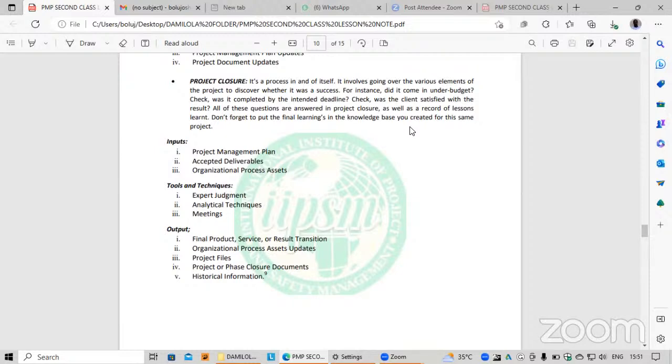And so it is the duty of the project integration manager, amidst other project managers on a specific project, to close a specific project by co-signing a document with the sponsor of the project, having received the deliverables of that project, and it is satisfied with the result.